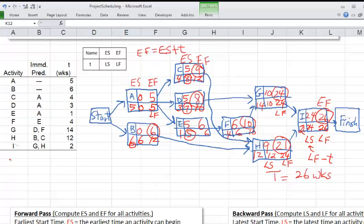So let's suppose that for the purpose of illustration, let's suppose we have another one more activity, J, whose predecessors are G and H, and activity duration is three weeks. So what would change is here we will have G, I, and then there will be another activity here J, like this, and the predecessors are G and H. So we will have arcs going from G and H to J.